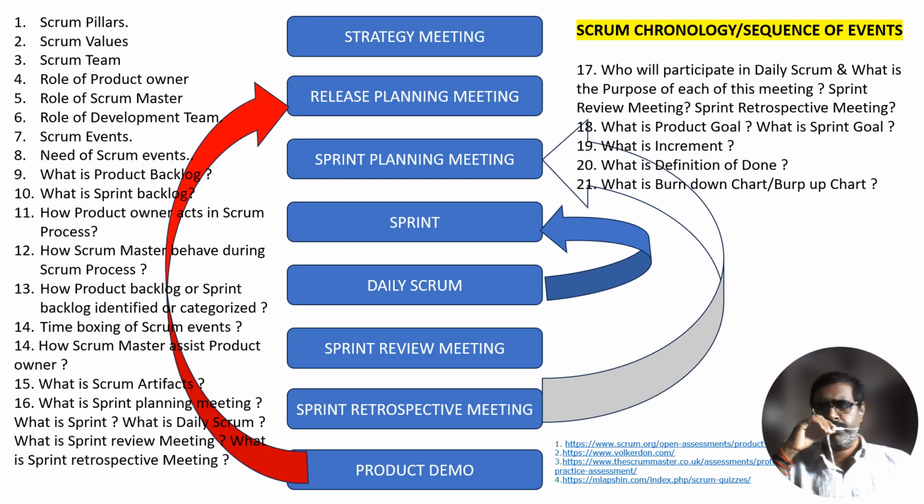It has a clear boundary, known stakeholders, and well-defined users or customers. A product could be a service, a physical product, or something more abstract. The product goal is a long-term objective for the Scrum team. They must fulfill or abandon one objective before taking on the next.